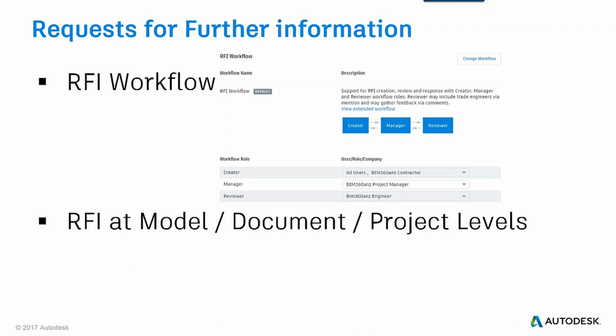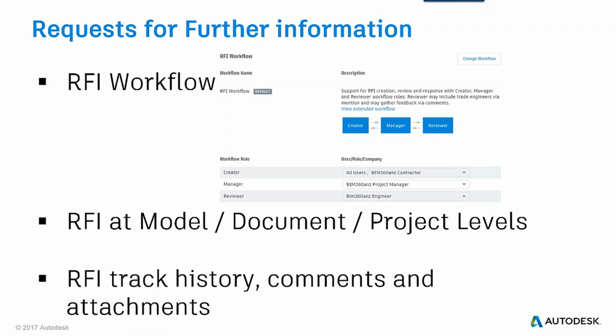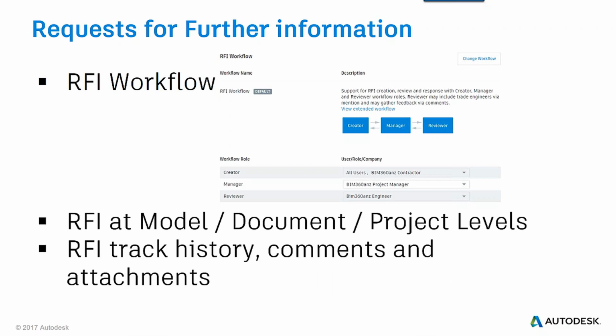Again, with the RFIs, similar to the issues, the RFIs can be created at model, document or project levels, and RFIs track history, comments and attachments as well, similar to issues, again all in one central location, giving you that accountability for everything that you do.